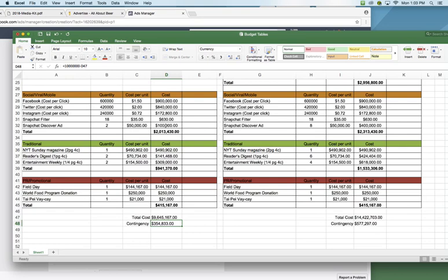And I'd usually like to say around 5% is what you're looking for in contingency spending overall. I've had students in the past go as far as 10%. And I wrote in your email that you could hypothetically do 10%. I'd still like you to stick around 5 or lower in terms of the percentage, just because this will make it a little bit easier. But you do want to have some kind of fund to be using here in terms of having this to spend.